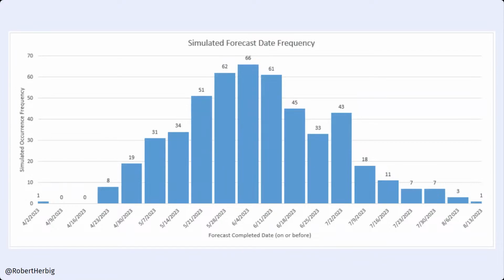And this is often because of the way that risk manifests in the execution of a project. We might have this nice, almost normal distribution, but then suddenly it becomes bimodal because of this little hiccup. And that often represents some risk that may or may not materialize, and we can see the impact of that. That is a good tool to have a conversation with our stakeholders.